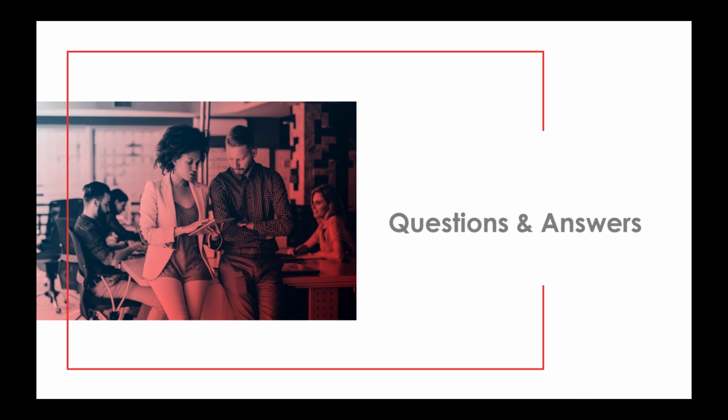Okay, Neil, assuming that you are talking about these little dots right here, the blue dots mean that a task has a date constraint, such as it's set to start on a specific date, or another type of task constraint. A red dot would indicate something about the task, such as the task was late.